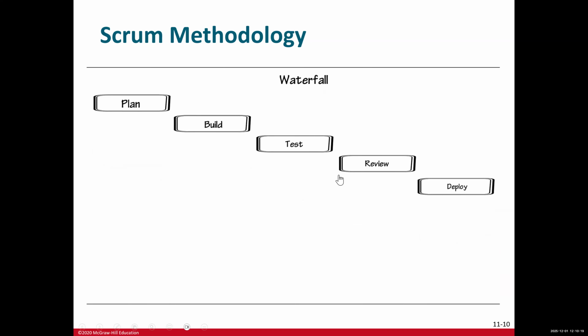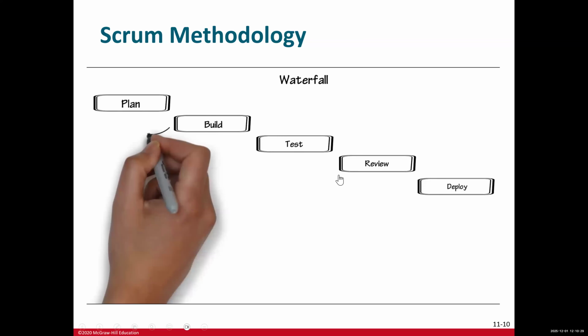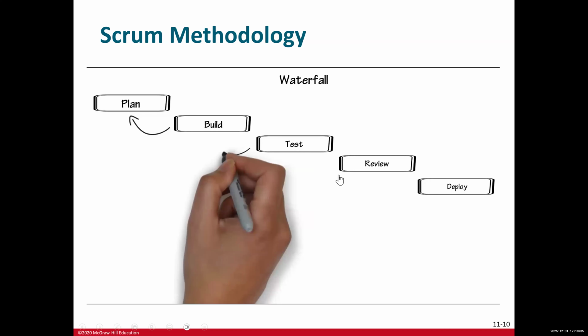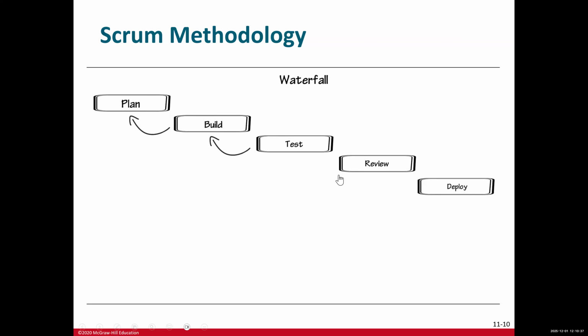First of all, the planning must be completed before any work begins, and in most cases the planning is done without entirely understanding the project. Once development is being done, oftentimes things get sent back to the planning phase, and the project either needs to start over, or the developers are just criticized for not understanding the plan. This cycle can happen many times.